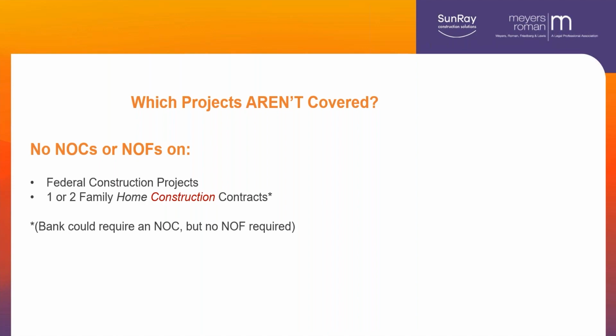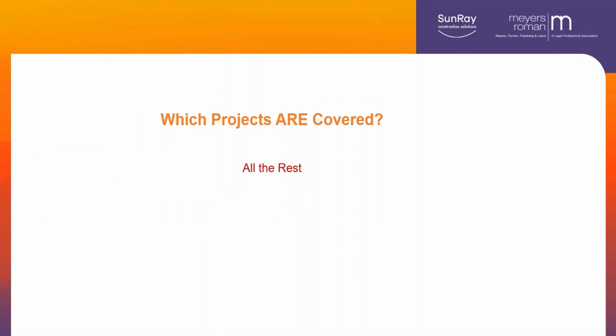I might have to do a notice of furnishing, but you want to do it anyway, unless you're just supplying a little bit. You know, you've got a few $100s of materials you're supplying. You're not going to file a lien over a few $100s. So if it's where you're going to consider filing a lien, then you want to do that notice of furnishing anyway, so everybody knows that you're doing the work and you're on the list. What's covered?